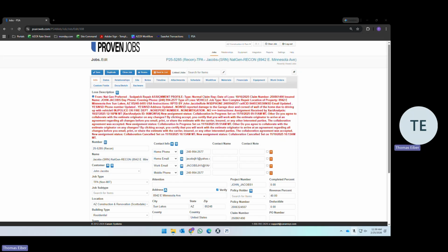Our next section is specific for proven jobs. It's the system we use here on screen. Daily and weekly tasks for your role. Daily, you are updating operations on any field reports, schedules, calendar changes, change orders, and status updates for all jobs that you have inspected that day.